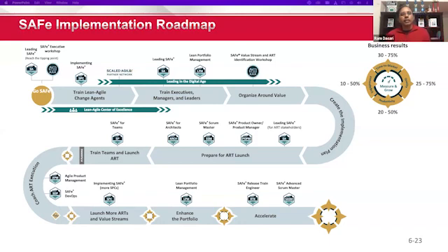And then once they are all ready, once they all have prepared what needs to happen for the PI, the PI planning happens. And once the PI planning happens, for two days, the team meets and they have a set agenda, where they identify, based on the capacity of each team, what features they can work on and what stories they can execute, and identify what objectives they have, and then finally they commit to those objectives.